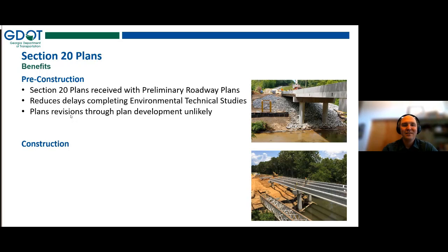We get them early. And then as needed, those plans can be revised throughout the plan development process if, say, something comes up during the bridge foundation investigation. But the idea is that we really kind of get that area hatched out large enough to where the plans never need to change. And so you create them early on with very little detail and you never have to change them. So that's the goal.